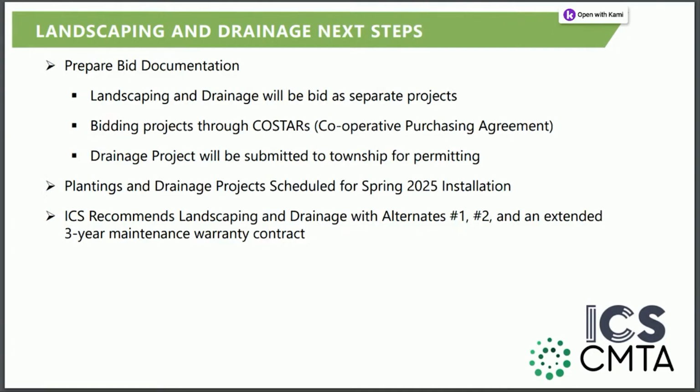So what are the next steps? Upon approval tonight, and as part of those professional services agreements, ICS would prepare bid documents, and that would include specifications for the contractors to bid. We would write the requests, put them out, bring them back, verify that those bids are complete, and then verify the qualifications of those contractors. At that time, we would put another recommendation together. We would come back to the board and present that recommendation.